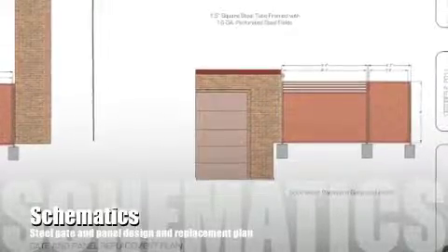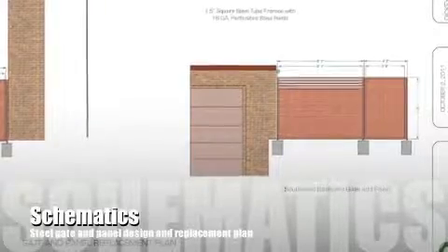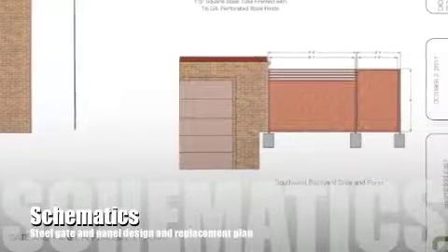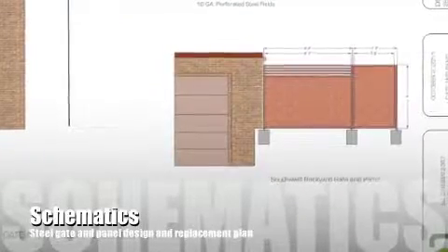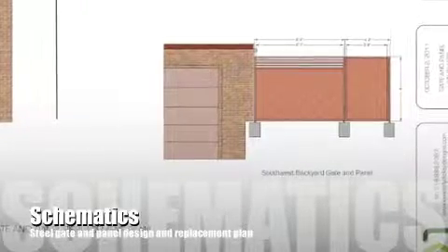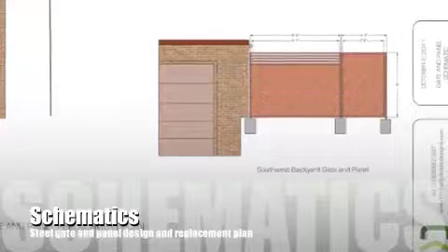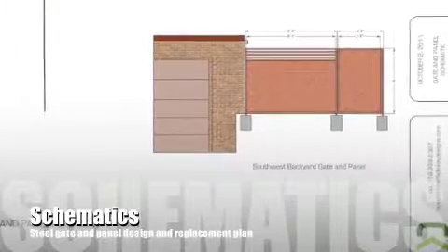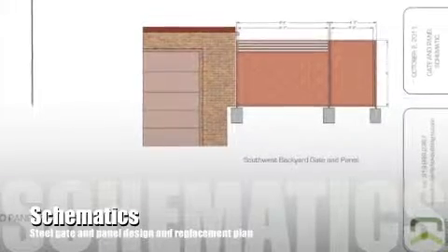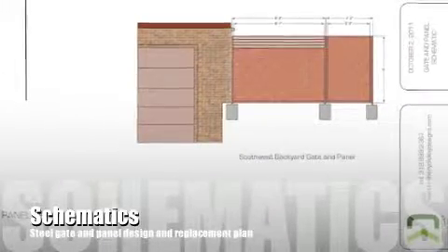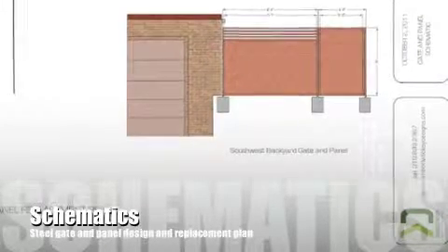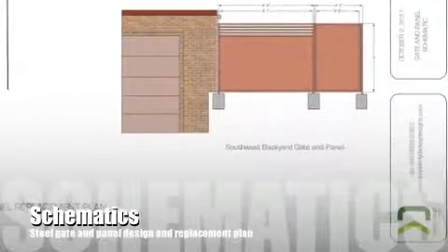Needless to say, in the material selection process, drilling down through all of these details, ultimately it was decided to work with steel. Schematically, the next steps in the process involved an assessment of existing site conditions, considering things that would change and elements that would remain static, taking site measurements and then ultimately developing and sketching out a set of design development and construction detail drawings which serve to inform the installing contractors, subcontractors, and all of those involved in sourcing and budgeting for materials, fabrication, demolition, installation, and commissioning.